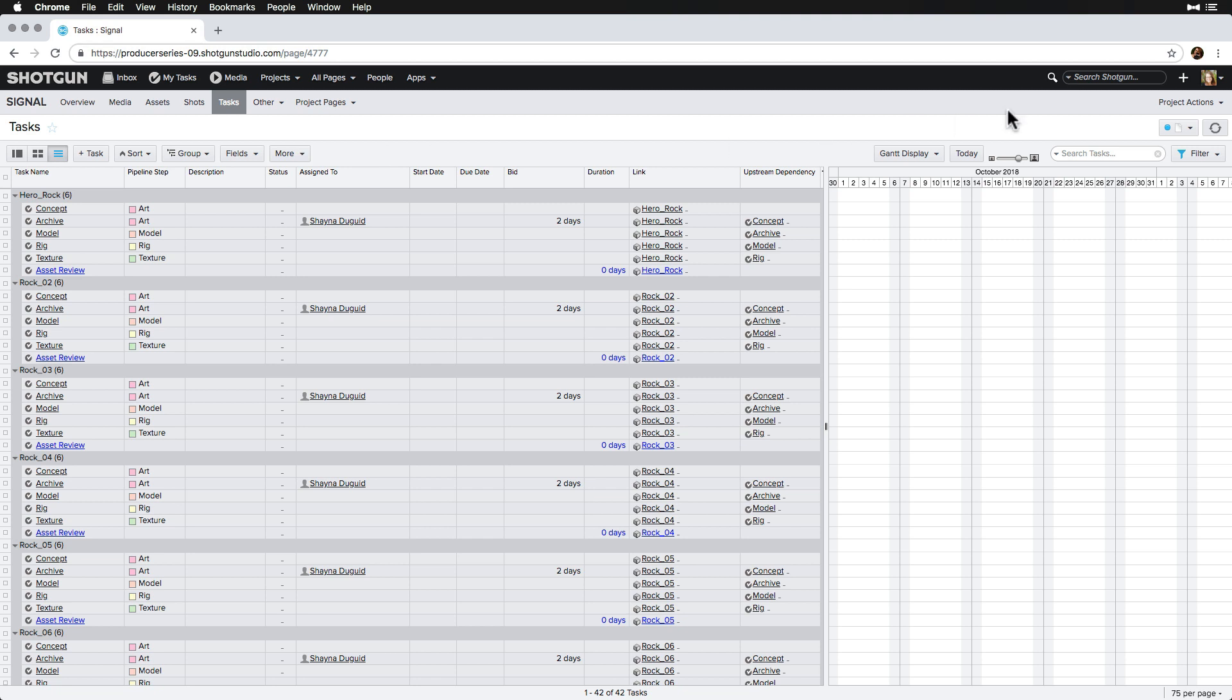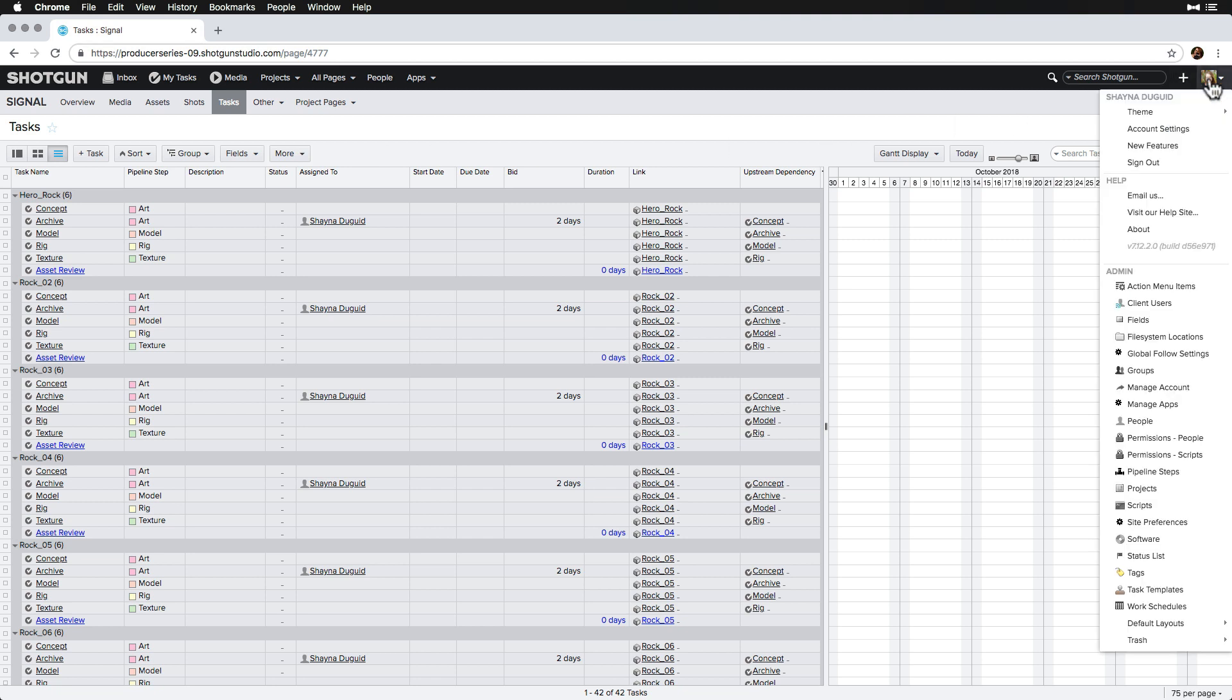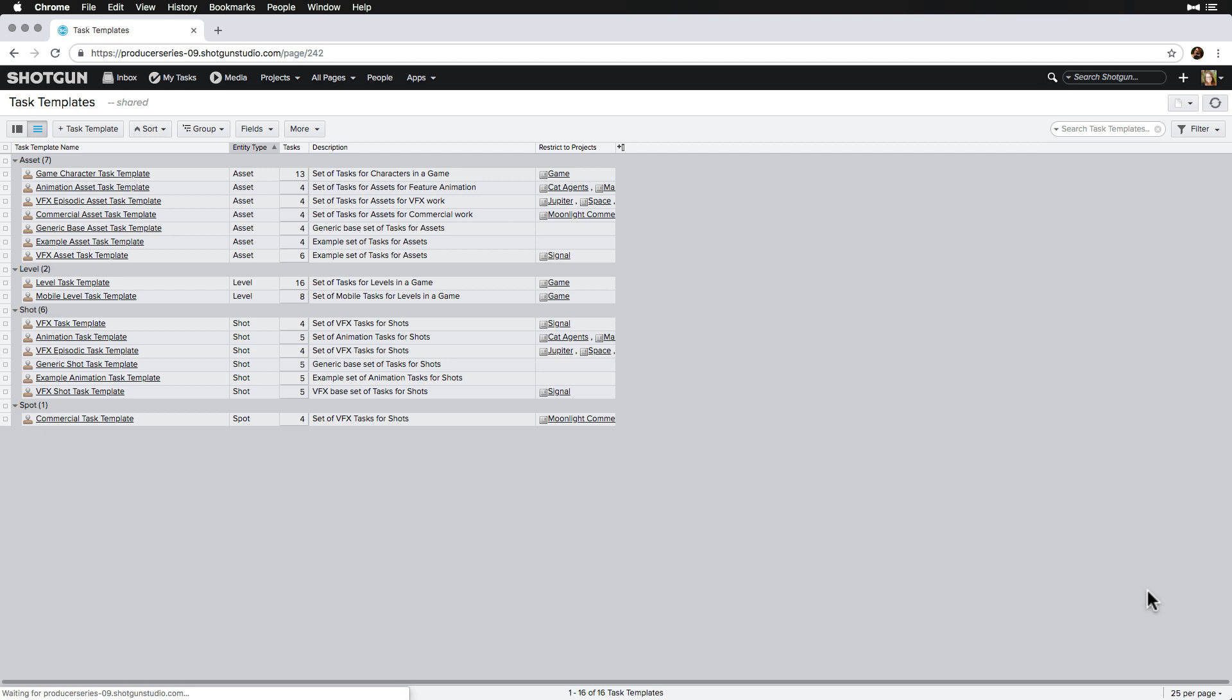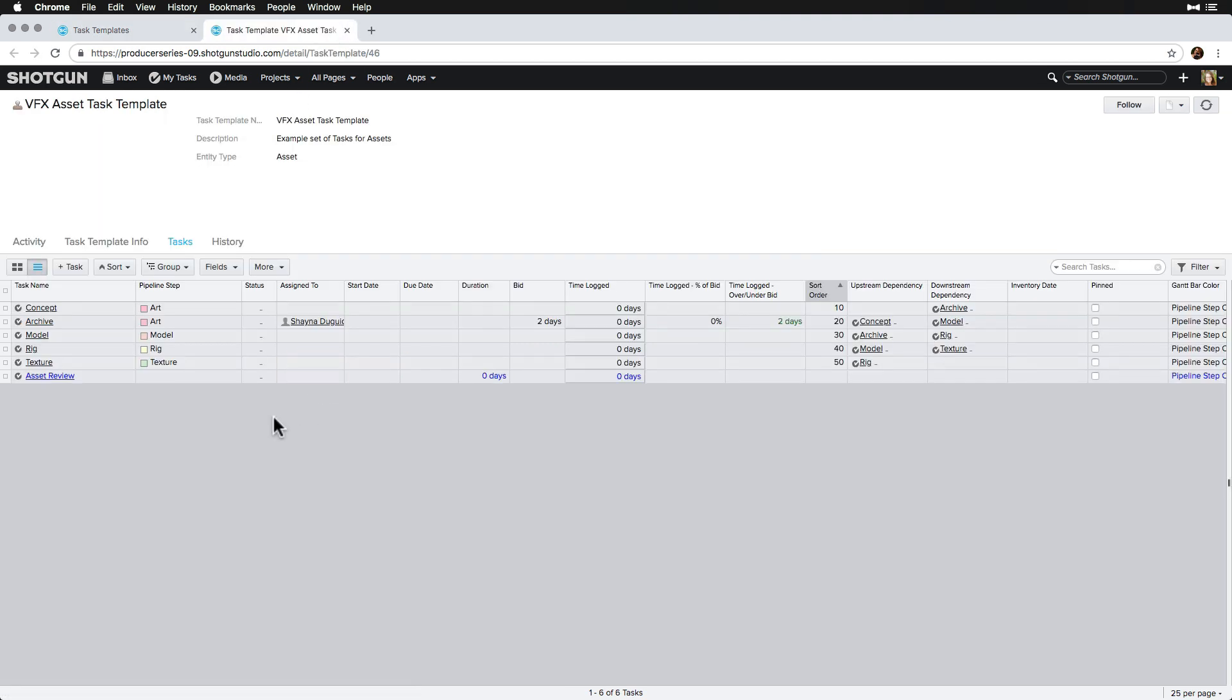Let's say we need to make updates to this task template later on. We can do so by heading to the task template page again and making the adjustments necessary. Note that task template adjustments are additive, so we can only add new tasks to entities the task templates are already linked to, but not subtract or edit existing tasks that are already linked to those entities.